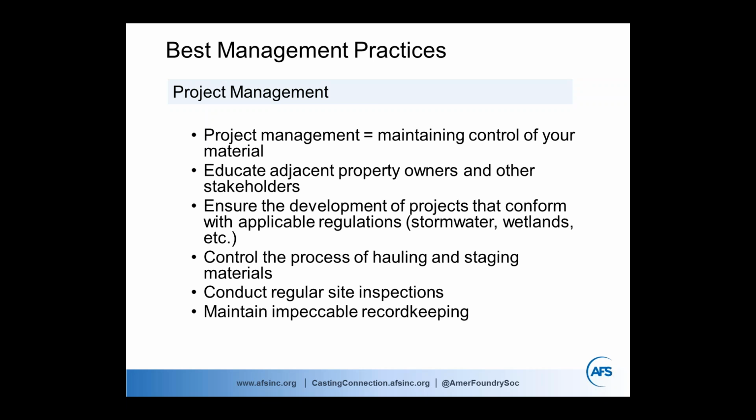If you include them all in the process early on, people are going to understand and you're going to avoid a lot of that. In some states, you're going to have some requirements where, if it's a certain size project or something of that nature, there might be a public information meeting required. But in a lot of cases, it isn't. So you may want to consider that it may be worth it to have a voluntary, preemptive informational meeting just to avoid any later misunderstandings.